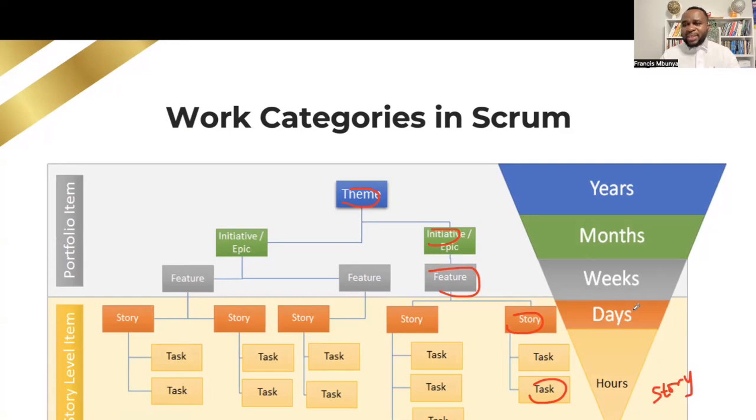But in reality, when you are managing the project, when the product manager and the Epic owners and the Epic lead are walking into the project, they actually use the categorization of years, months, weeks, days to categorize if a piece of work will be considered a theme, an initiative, an epic, a feature, a story, a task, and a subtask. Right.